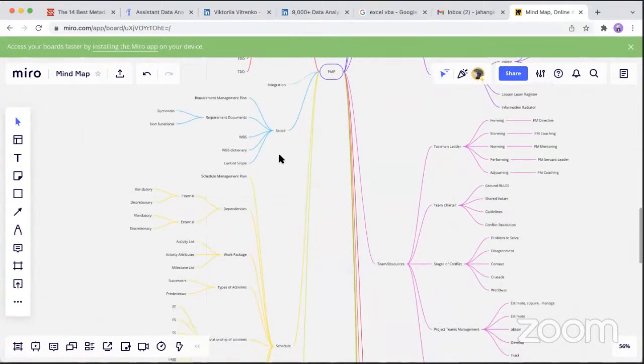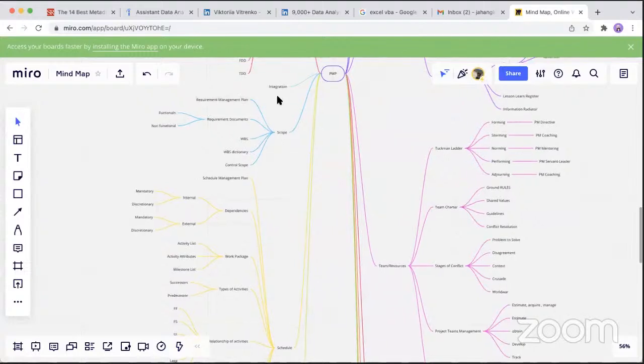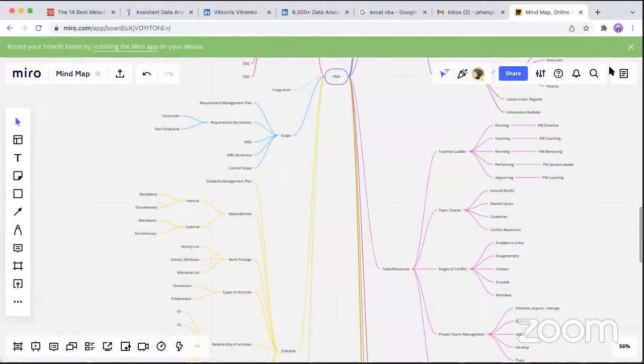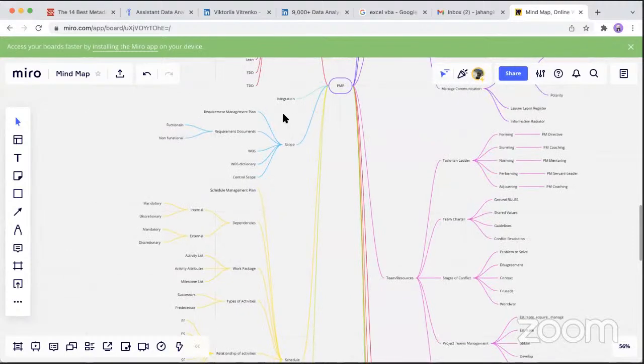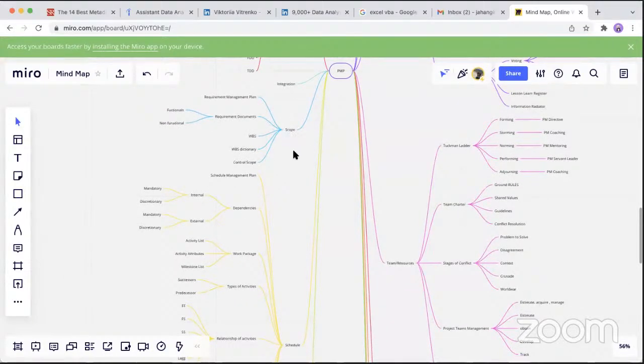Yes, first start from integration. In integration, we define the project charter. Then we have the planning step of integration. In plan integration, we combine all the subsidiary plans. Then in manage integration, we direct and manage project work. We get some deliverables in manage integration. Then those deliverables go to control quality. If accepted, they become verified deliverables. After verified deliverables, they go to the customer check. If accepted, they become accepted deliverables. After this, we go to the control integration process. In control integration, as I mentioned, we validate the scope and control the scope. After that, we go to closing integration.